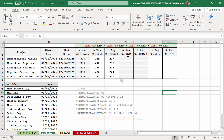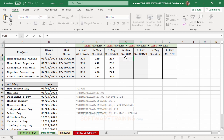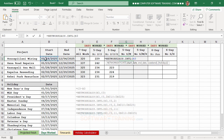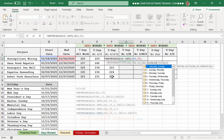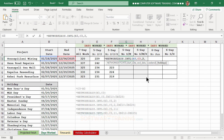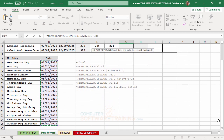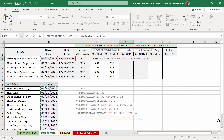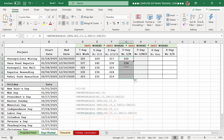For the Sunday-Monday weekend scenario, we use NETWORKDAYS.INTL. We type equal, 'net', and select NETWORKDAYS international. The formula takes start date, comma, end date, comma, and then the weekend code — number 2 for Sunday-Monday — then comma and select the holiday range, press F4, and press Enter. We copy the formula down.